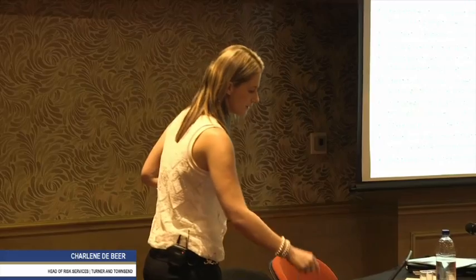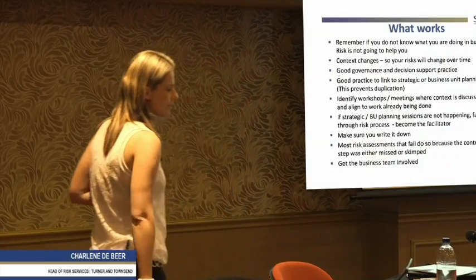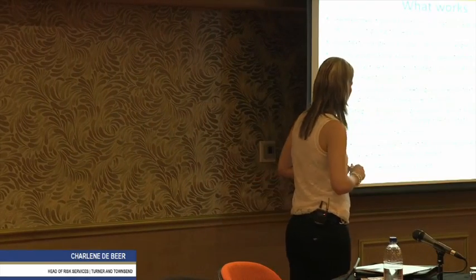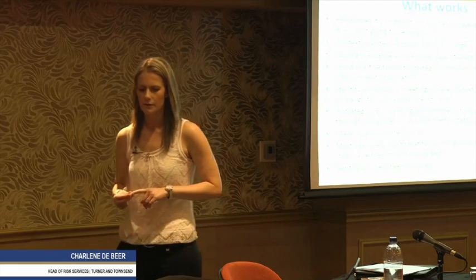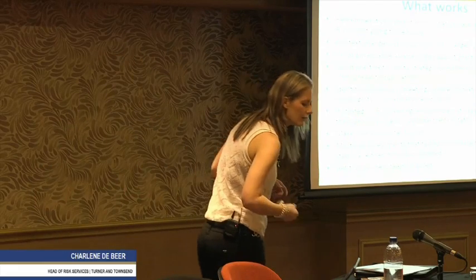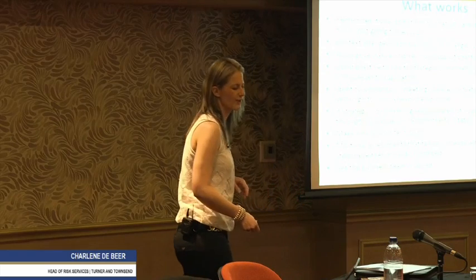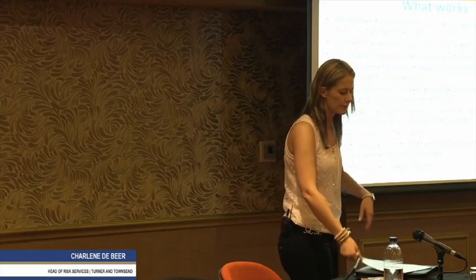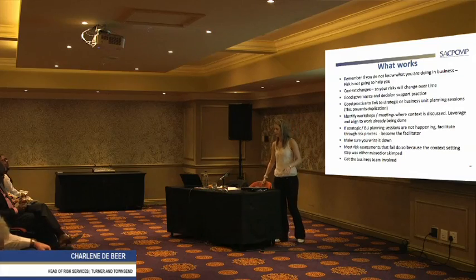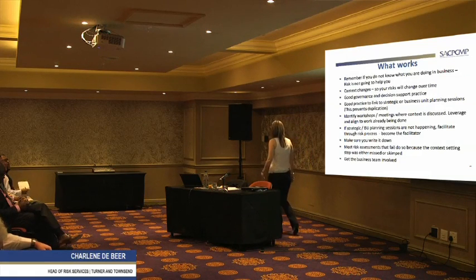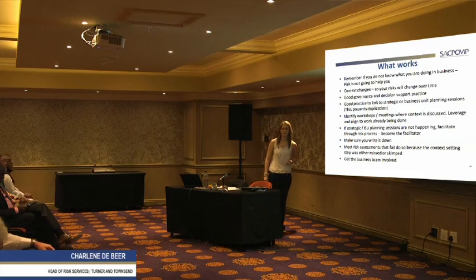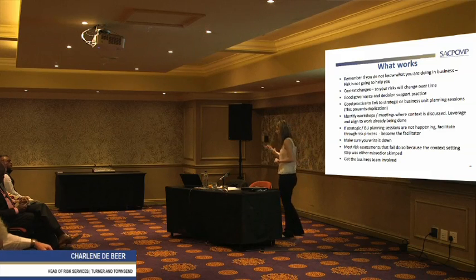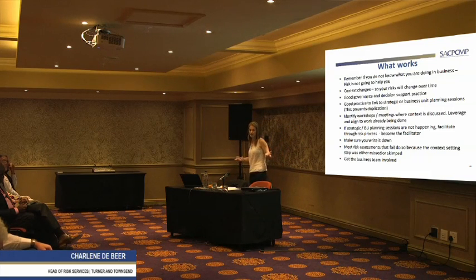And then a few last things. Most risk assessments fail, they do, because the context-setting step was missed. So it's kind of like, well, these are the risks, and then you'd ask, well, are they really real risks? And remember, we need to mitigate the cause, not the risk, and guys are like, oh, whatever. There's 5 causes, but we've got 3 mitigations. We don't really care about this analysis, we just want to get this risk workshop done and dusted. If it's done half-heartedly, I would sometimes tell the guys, well, you're not even committed, so don't even bother coming to a risk workshop.